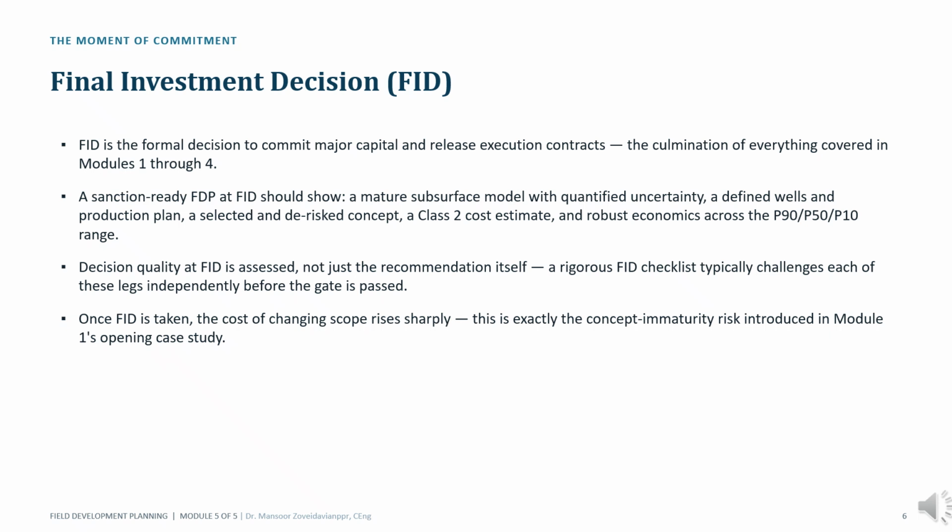Good organizations do not simply ask whether a project looks attractive. They ask whether the decision itself is based on sufficiently mature information. After FID, the cost of change rises dramatically. That is why decision quality is every bit as important as project value.